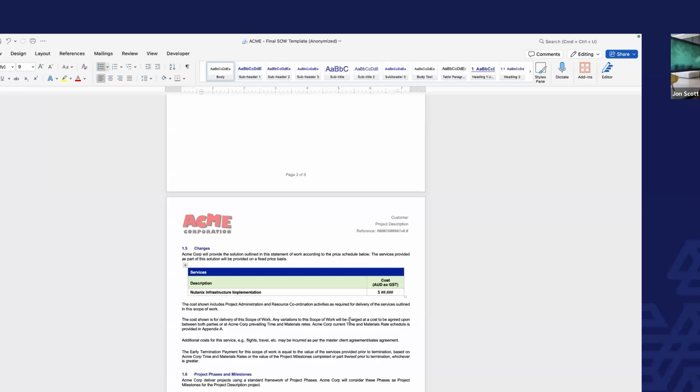So they might have a budget and they might say, hey, fixed fee is good for us because we want you to take the risk. If it's a project or a service that you've done a lot of, you're willing to take that risk because you kind of know the ins and outs. If you can align on that, that's a good agreement to align on.